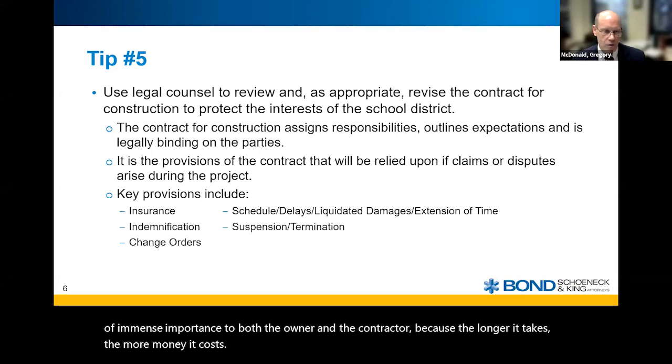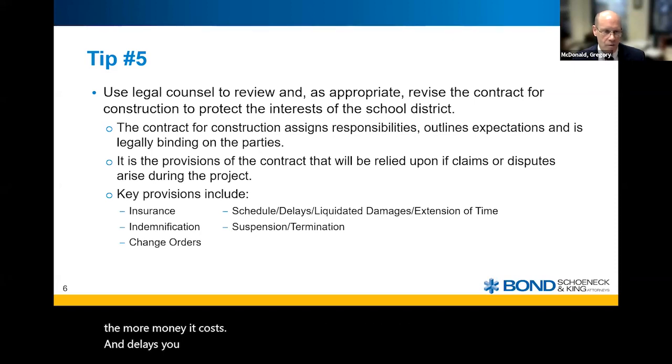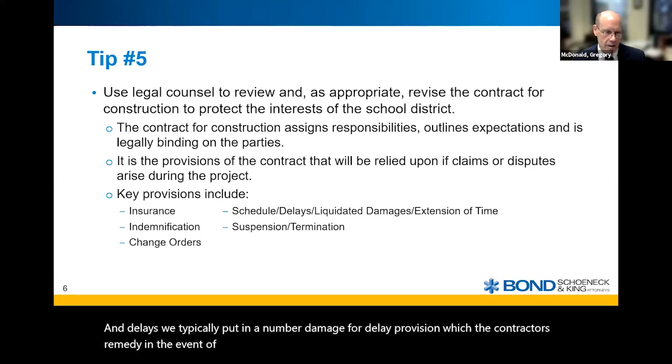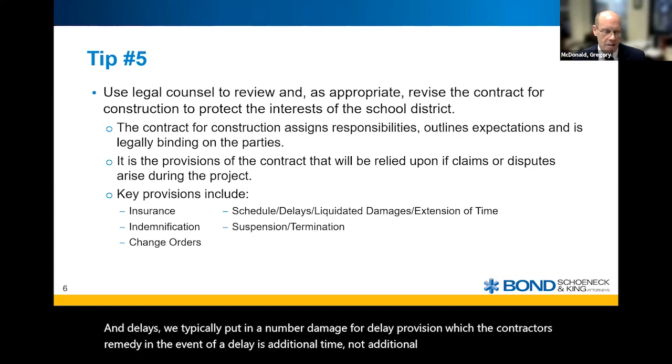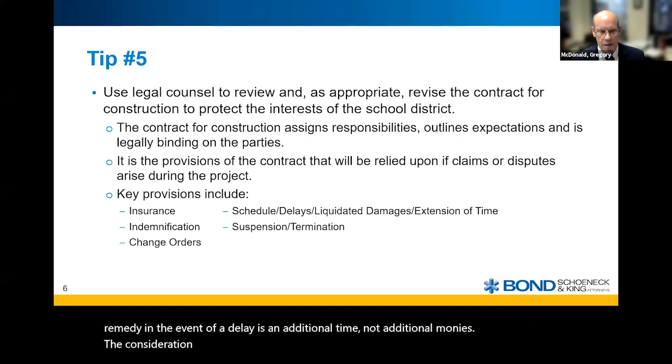And for delays, we typically put in a no-damage-for-delay provision, where the contractor's remedy in the event of a delay is additional time, not additional monies. Then there's the consideration of liquidated damages.